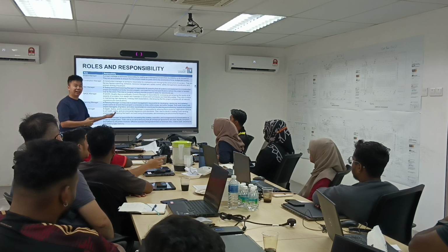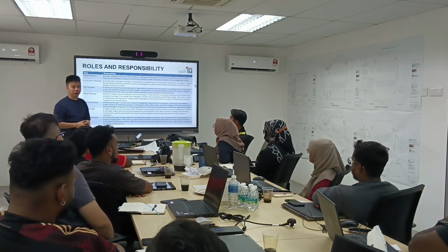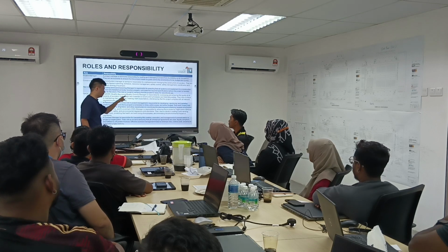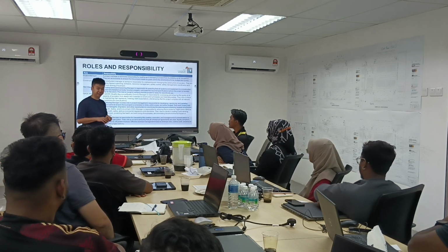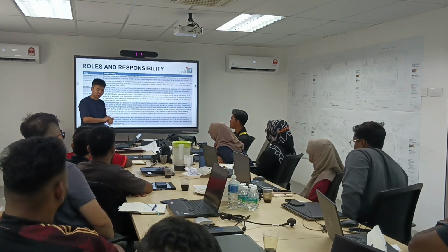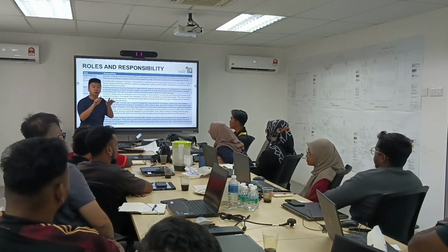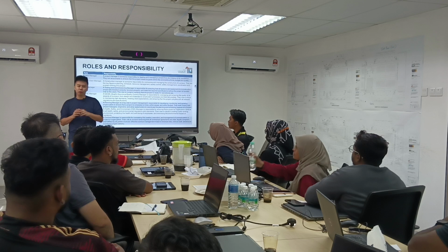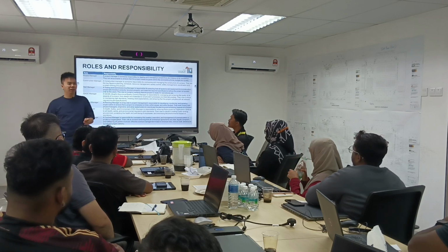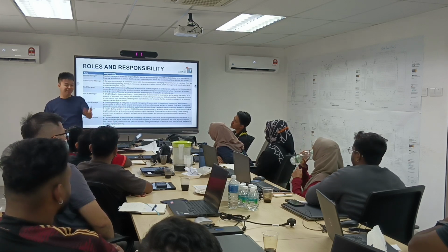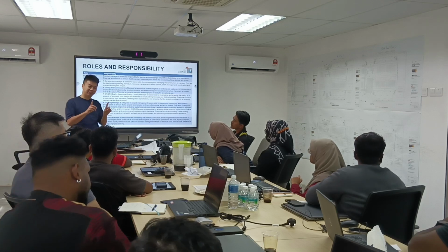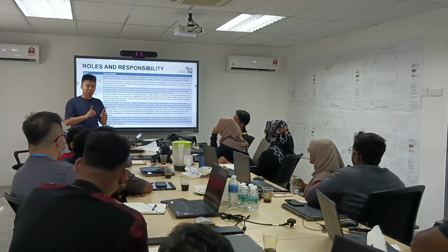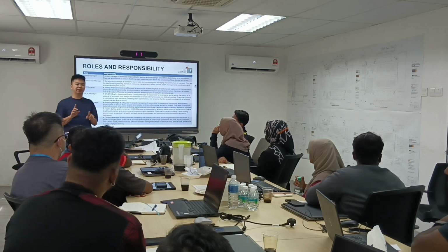QA/QC is a guy who comes and does random checks. They are actually not quality control, they are quality assurance. They do the process and make sure you follow the quality required. On a day-to-day basis, you should be the one controlling the quality. A lot of people tell me, oh no, my job is just to finish the project, then QA/QC comes up with an issue list, then I go and fix that. This mindset is damn wrong. It's actually super wrong. I hope you guys do not have this mindset.